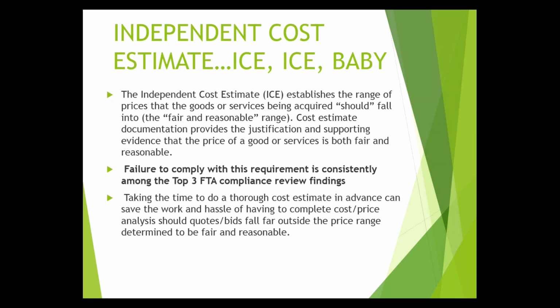It's actually fairly simple, and when you get used to using an ICE, I think that from my geeky perspective, I love independent cost estimates because they help everything else. They help the rest of your procurement really run smoothly, and it's my hope that once we all get used to using these, they're going to become a tool and not an additional documenting burden to you. Taking the time to do a thorough cost estimate in advance will save you the work and hassle of having to complete cost and price analysis should your quotes and bids fall far outside the price range that you've determined to be fair and reasonable. I went over that already, but just can't say it enough.